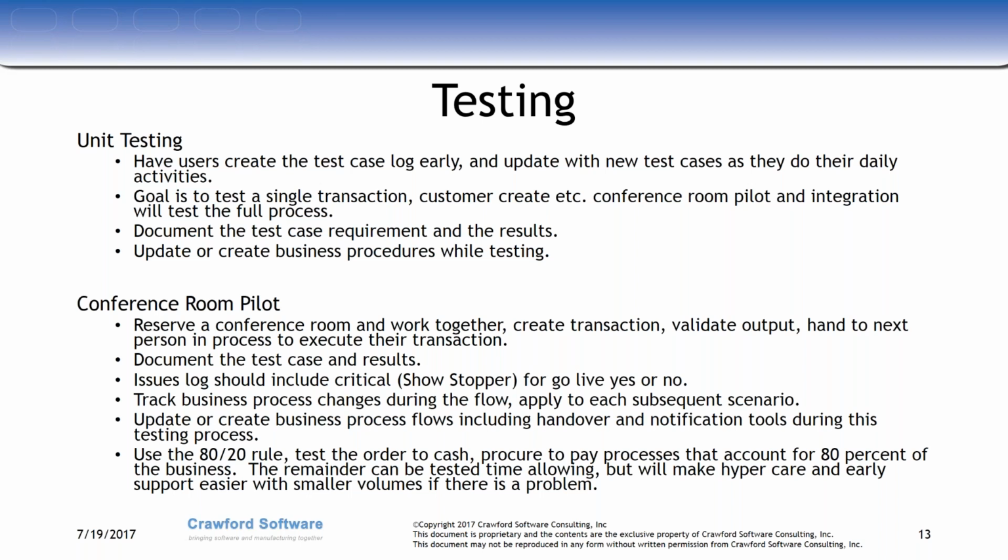If you don't use subcontracting except once or twice a year, document the scenario, have it laid out as a possible test case, but put it near the end. You want to do what's your bread and butter, what satisfies your customer orders, what generates revenue, what fulfills the business needs. Address those first. If you're make to stock and ship from inventory, do all the different iterations of those primarily first. Work the exceptions later on.